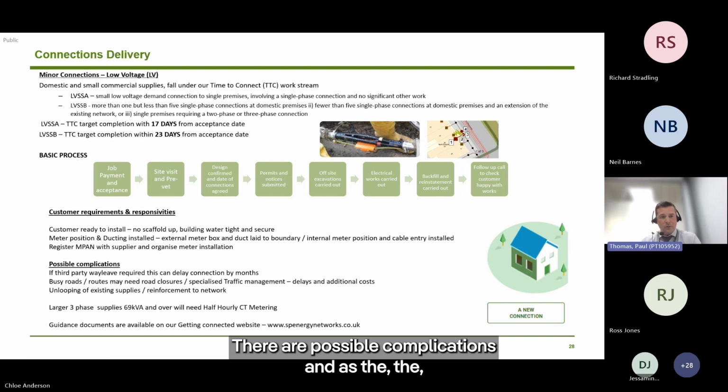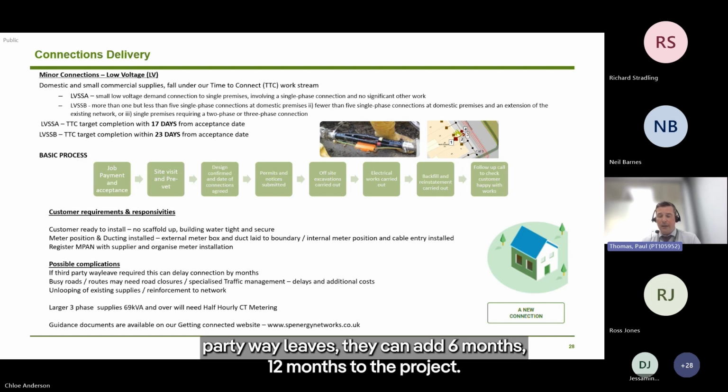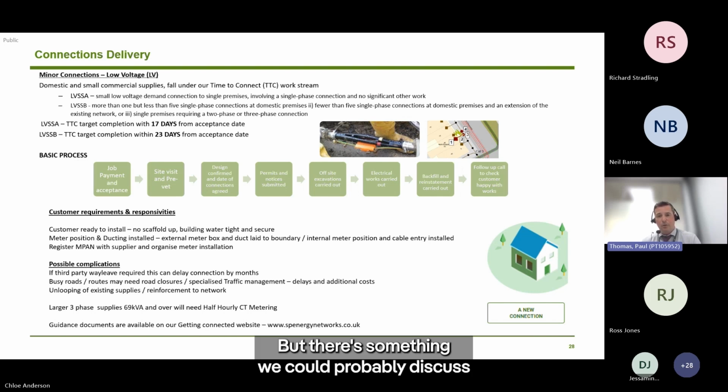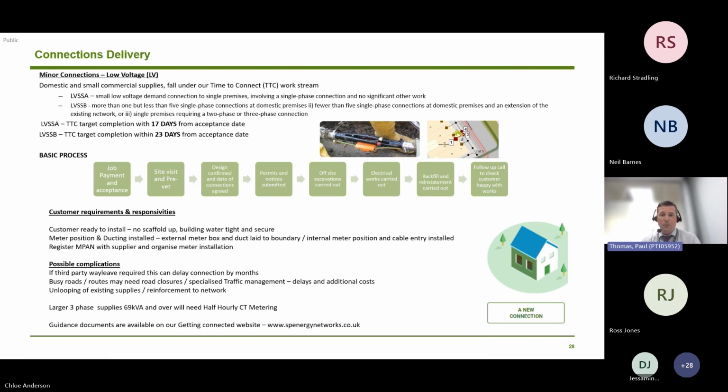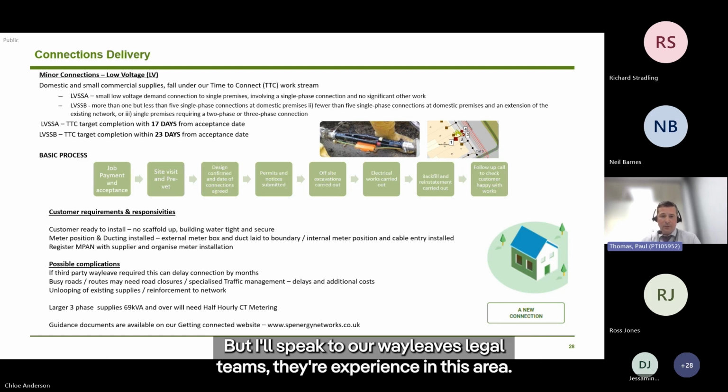There are possible complications, and as we'll discuss in the wayleave section in a minute, if there are any third party wayleaves, they can add 6 months, 12 months to the project. But that's something we could probably discuss with your design team and possibly us before you accept, and we could see what we can do, whether you get your own wayleave to try and speed up the process, or I'll speak to our wayleaves legal team, who are very experienced in this area.